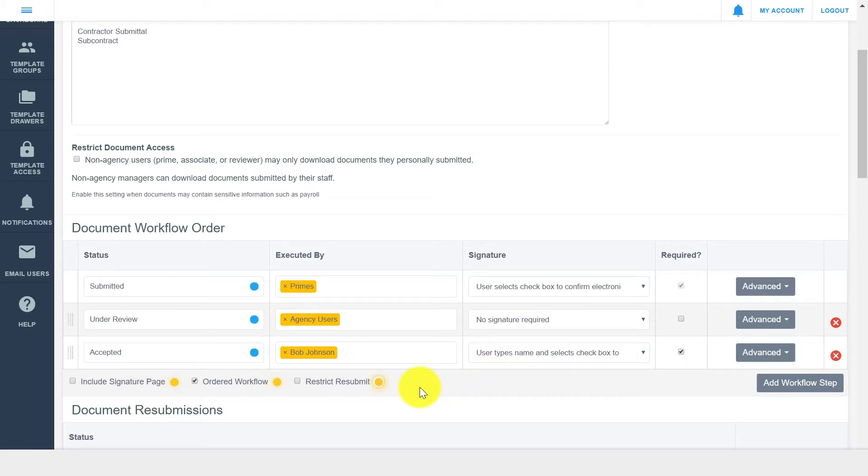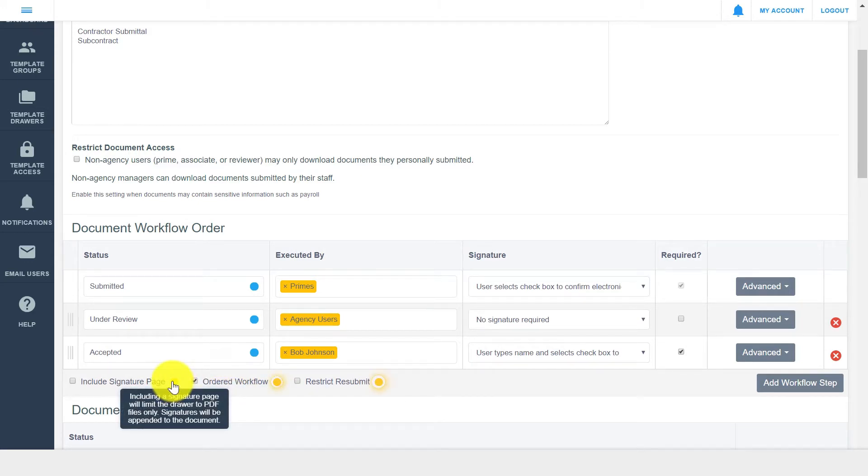You can also see that there are a few other workflow options. The include signature page checkbox adds a page of up-to-date signatures to the end of a document. If the signature page is included, the document uploaded to the drawer must be a PDF file.